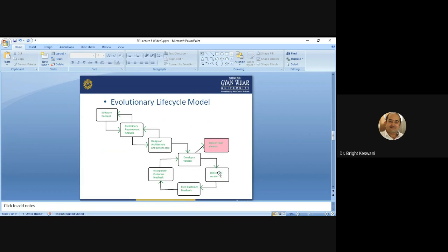The second disadvantage is difficulty in estimating cost and schedule at the start of the project when scope and requirements haven't been established. The third disadvantage is time apparently gained on the front end of a project because of early releases may be lost later because of the need of rework resulting from evaluating requirements.